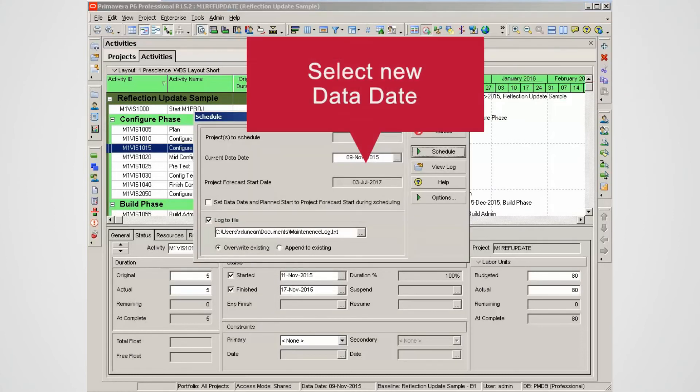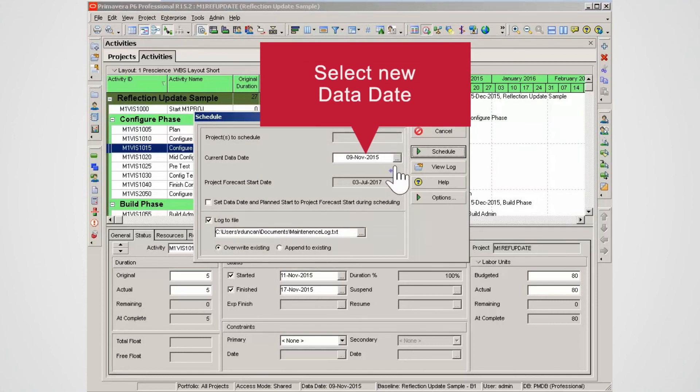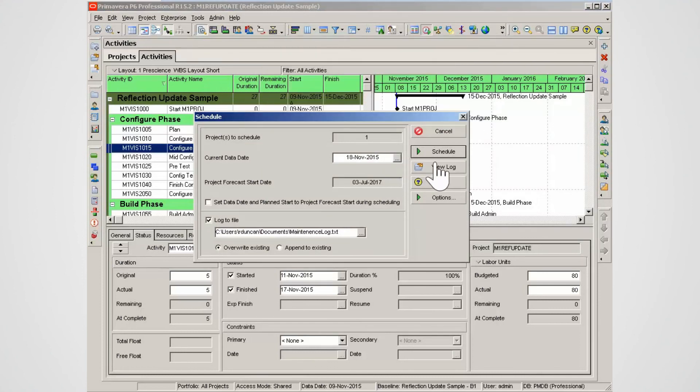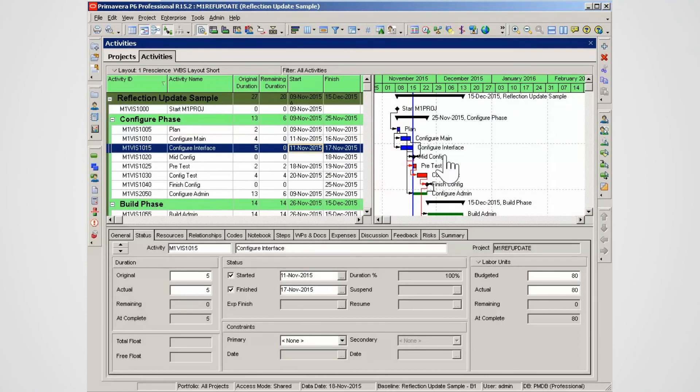The data date needs to be moved forward. Schedule the project with the new data date. The project is now up to date.